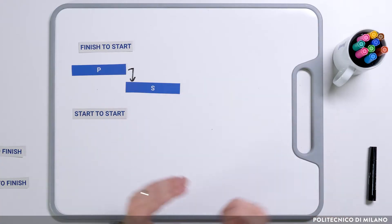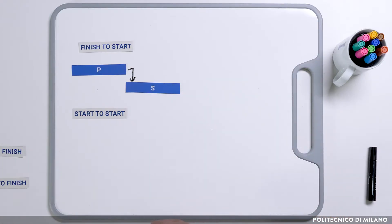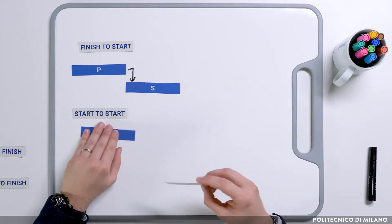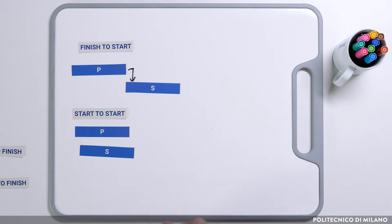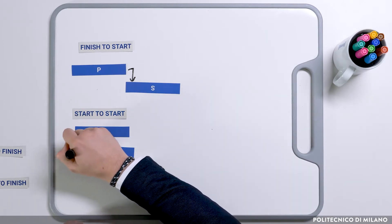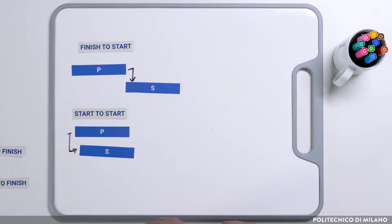The arrow represents the logical relations among activities. A second type is start to start: the predecessor must start before the successor can start. For example, road excavating must start before asphalt can be laid.